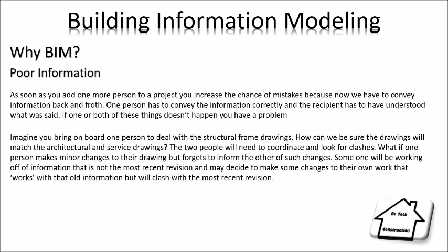Imagine you bring on board one person to deal with the structural frame drawings of your shed. How can we be sure that the drawings will match the architectural and service drawings? The two people will need to coordinate and look for clashes. What if one person makes a minor change to their drawing but forgets to inform the other of such small changes? Someone will be working off of information that is not the most recent revision and may decide to make some changes on their own work that works with the old information but will clash with the most recent revision.